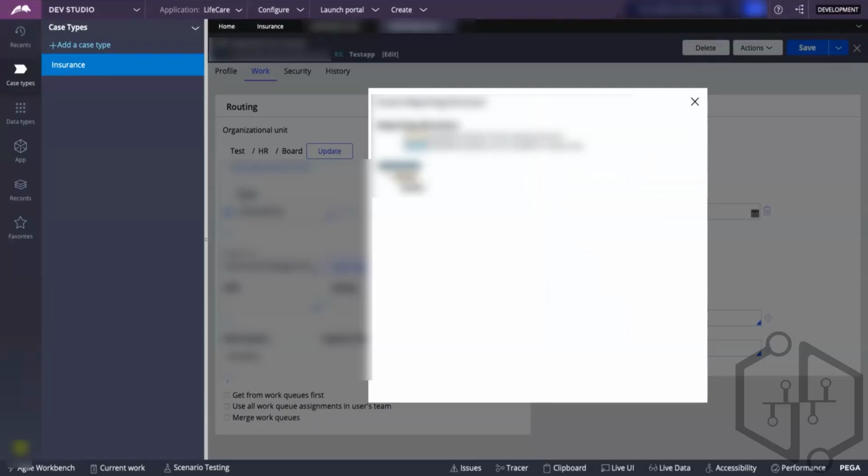So suppose Harsha can only give approval for $1,000 products. Francis can only give approval for $10,000 products. Administrator can give approval for $100,000. That means it is a structure through which approval will flow.